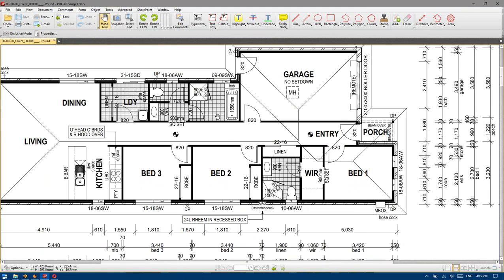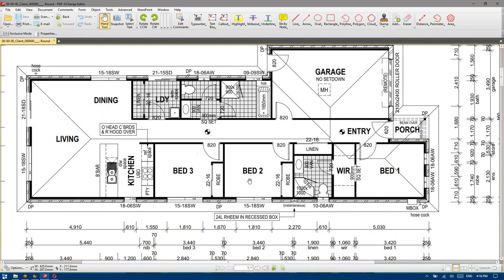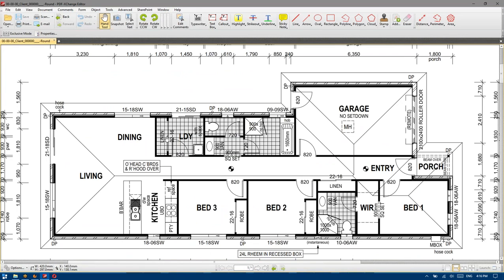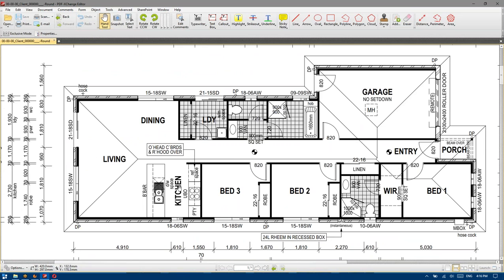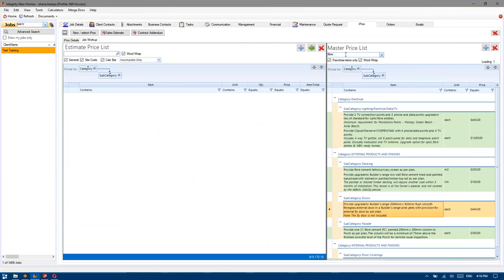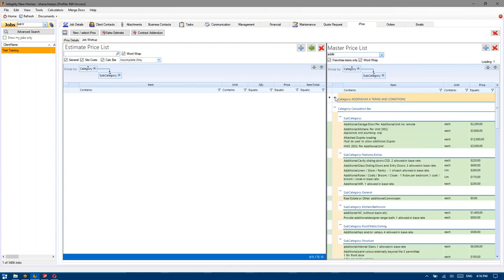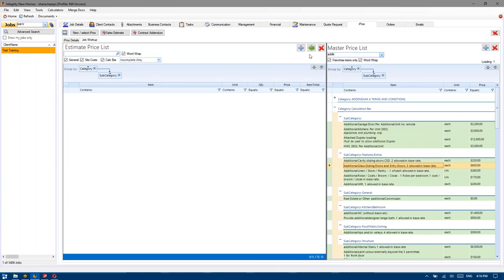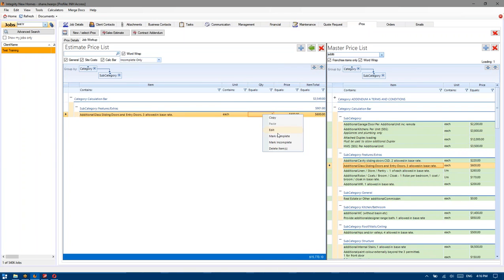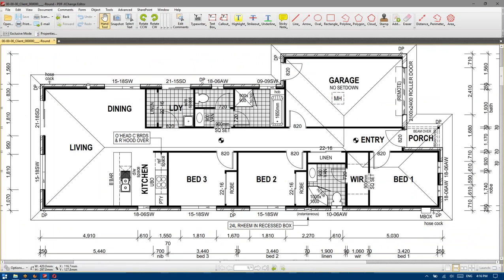We've got the awnings all four of them, we've got the square set, standard vanity, standard shower, standard recessed gas, hot water, one robe, square set, picked up the extra linens. There's no bulkheads, there's only four external doors. So if we go additional and then hit the down it will bring up the calc bar — where we added all those items recently after feedback — and we've got the additional glass sliding doors and entry doors, so we hit one of those because we've now got four doors instead of the three. And two hose cocks.